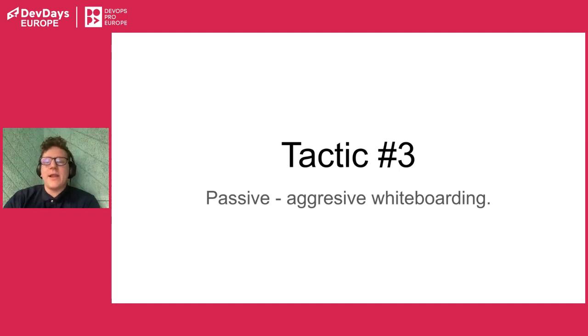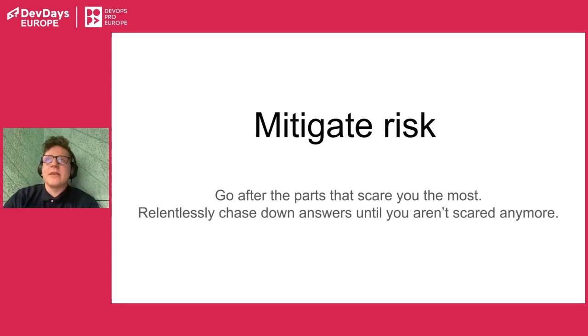The other thing I like to do to mitigate the risks that I can spot in the project is this onboarding, which helps me sit with the senior engineer or staff engineer or principal and go over this complex feature that I think might get more complicated. I'm sitting and listening, and the person is explaining to me how it's going to be coded, how we're going to test that, how we're going to prepare the environment, how we're going to deploy this.